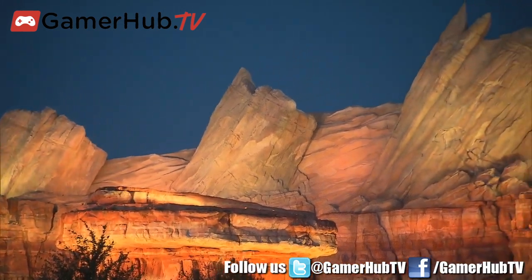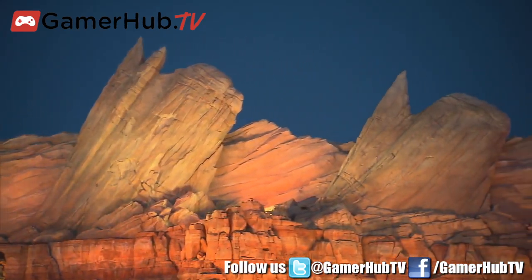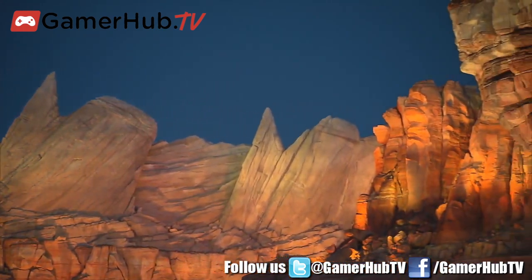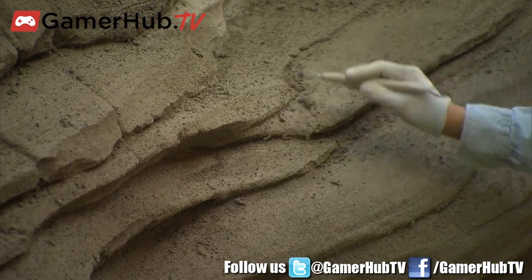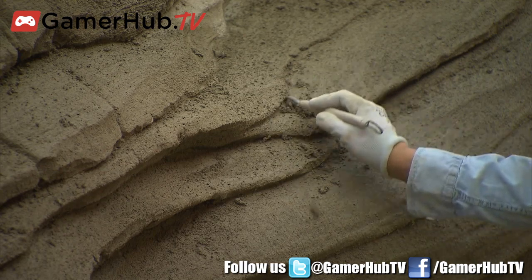The classical way of doing rockwork at Disney for years was you field build it. Basically, someone has a model, they lay a rod out on the ground, they bend it in place, and they go, well, close enough. Obviously, by using the digital environment, we're able to get very exact tolerances. So from the design moment to the point where we're putting plaster up on the chip, it's all done in 3D. And it addresses all these old coordination issues that used to haunt us. So that's a big deal.